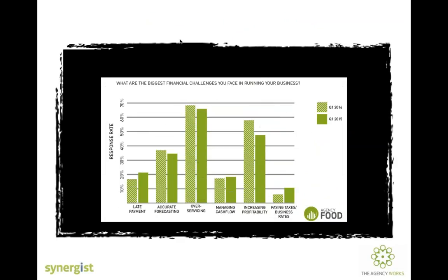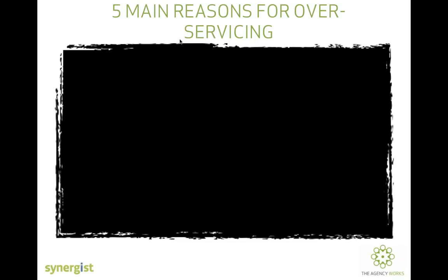This report here is some stats taken from a recent report which we carry out on a quarterly basis. This is a comparison from 2015 to 2016, and you can see that the biggest financial challenge, sort of ongoing, is over-servicing. Over-servicing is a massive effect from inaccurate capacity planning and resource management. So, inaccurate estimating, and other reasons.